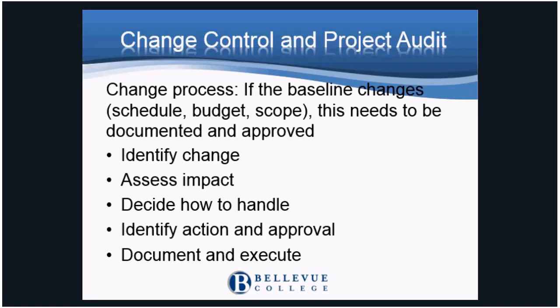Taking the documents that have been produced for change management and then executing those documents as part of the process. For the approval of the change, there may be some question on who needs to approve. Is it only the sponsor? In some cases, where there is a budgeting change, the financial manager may need to be involved.